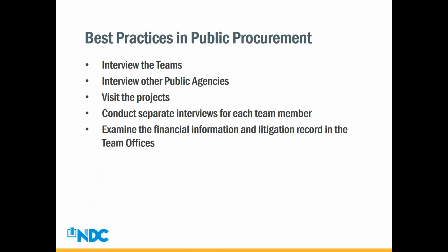Best practice. Here's what you have to do. So now you're ready to do it. The community or the sponsoring entity has to interview the team. And our advice is that you interview the teams separately. You don't try to interview everybody all together. And interview other public agencies that have used the team.